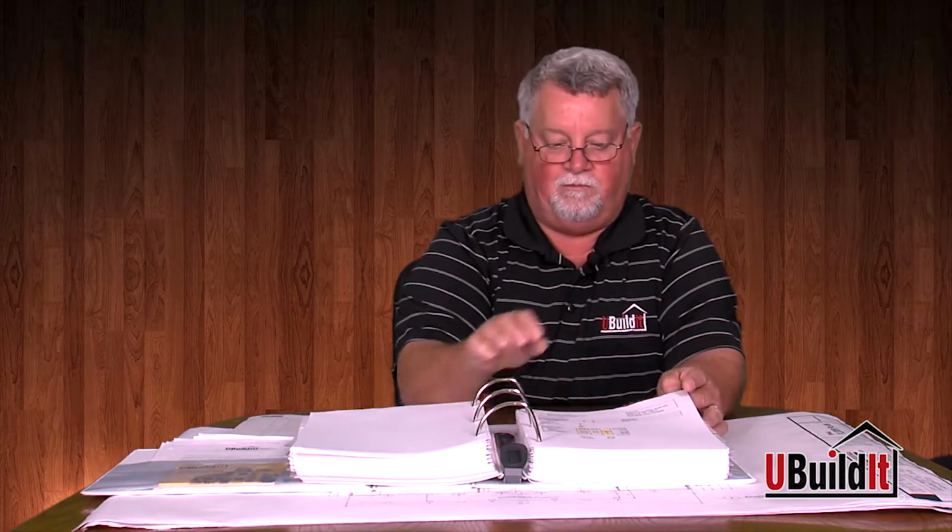We type all this into our computer, and it generates this worksheet. The worksheet is for estimating budgets. It's how we come up with estimated budget. We're constantly having to update that with the rising cost of materials. We change our formulas to make sure that we have adequate amount of material or labor. If labor happens to go up, that's all done with our worksheets. Behind the worksheets is usually our bids and our flyers.